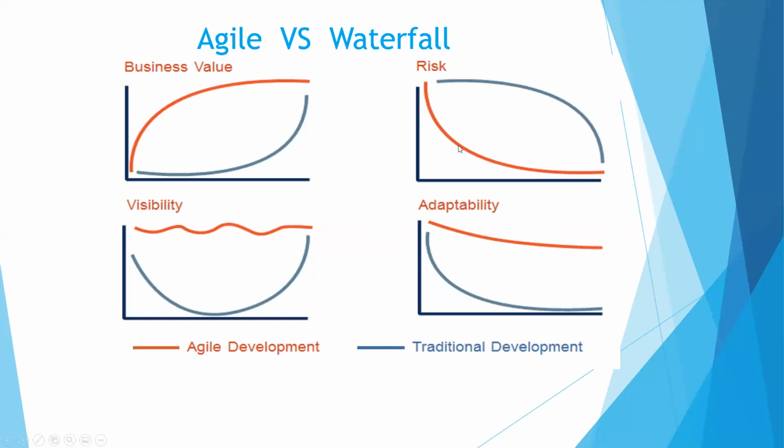Then the sprint backlog, the Scrum Master is going to review it. Sprint backlog is the list of work that needs to be done in a sprint that has been agreed. We're going to be making sure that it's accurate, it's testable, it's estimatable, all the admin and other checking. The Scrum Master is going to be doing that too. In addition to other artifacts that the Scrum Master is going to be working on, when we get to Scrum, I will cover those in detail. So the Scrum Master has some documentation responsibility, but not every one. Are you getting it? Okay. Yes. Thank you.